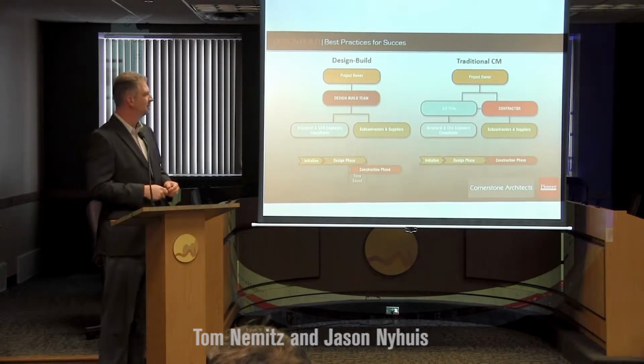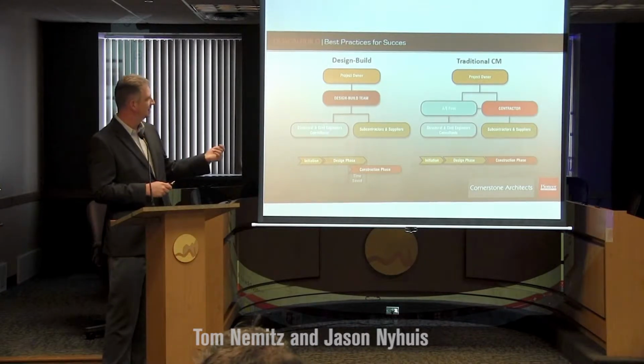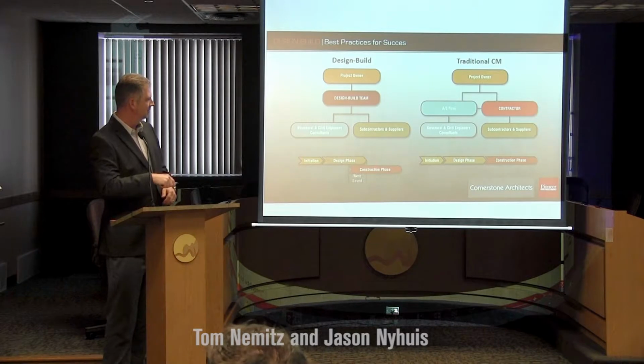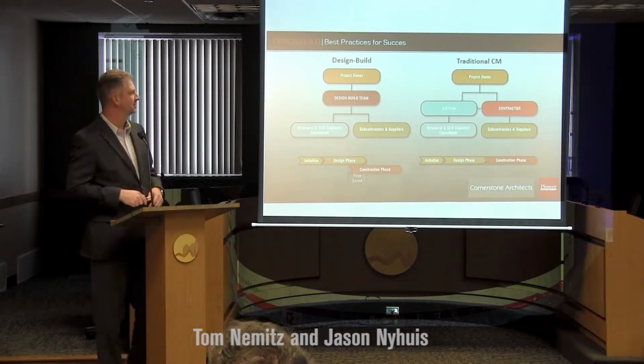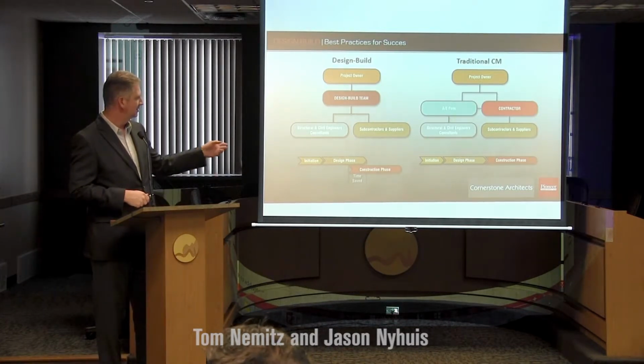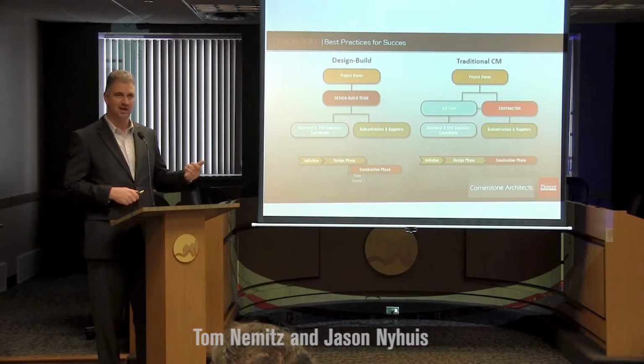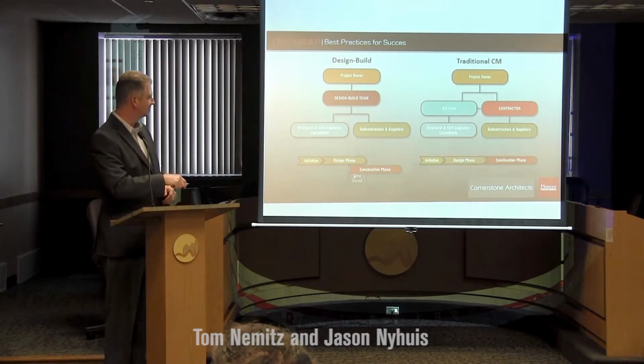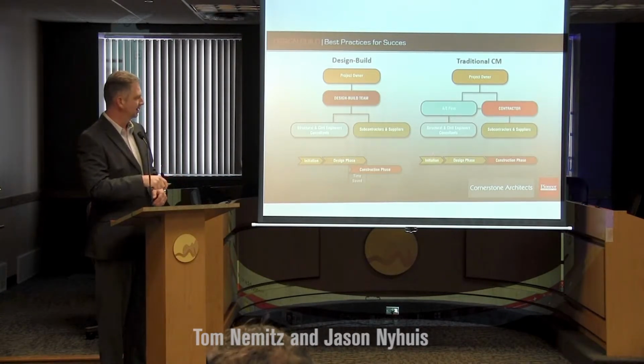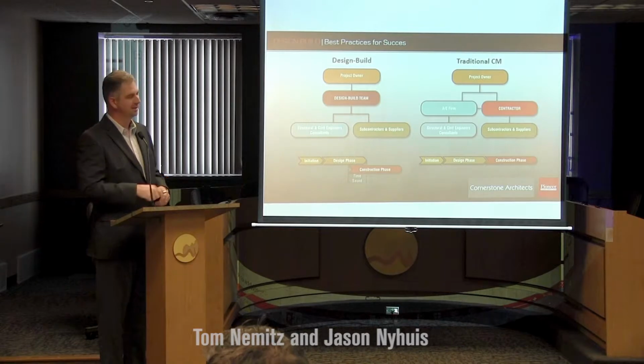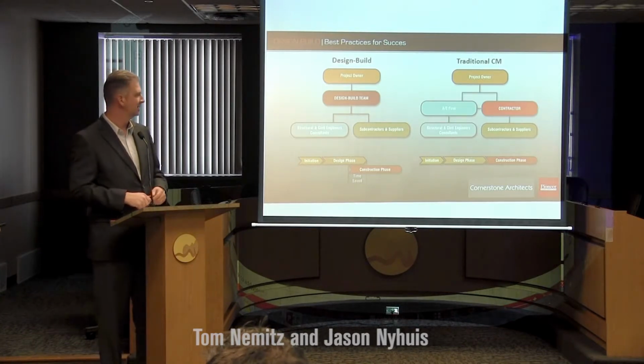As we start talking about it too, one of the big things that starts to happen in design build that's presented today is time savings. Why go design build versus the traditional CM approach? And you start to see where that time saving starts to happen, where you're starting on some of the construction process as it's happening during the design phase. Whereas the traditional, it kind of goes initiation, design, then the construction portion of it.